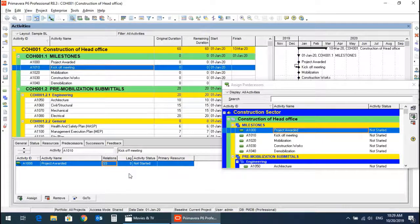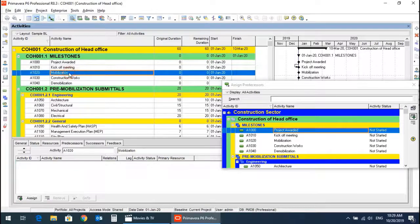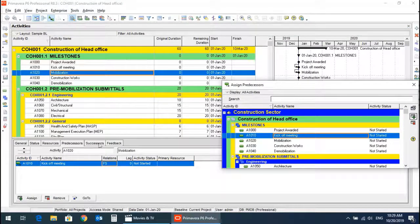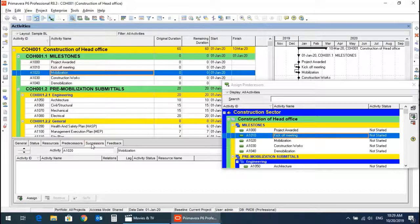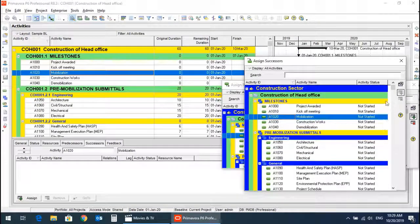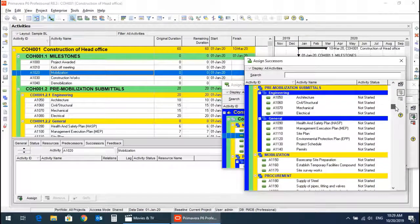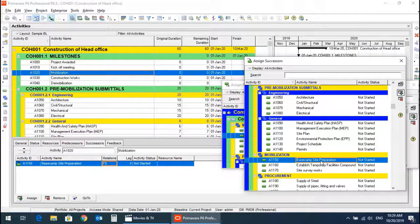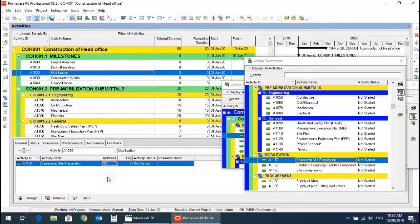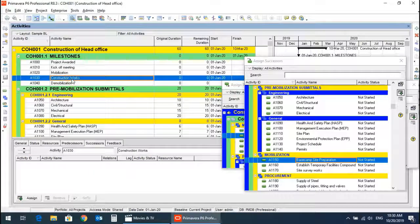Mobilization has a predecessor of kickoff meeting. If mobilization is started, it will have a successor of site mobilization. We will assign base camp and site preparation as the first activity of mobilization, and the relationship will be start-to-start.